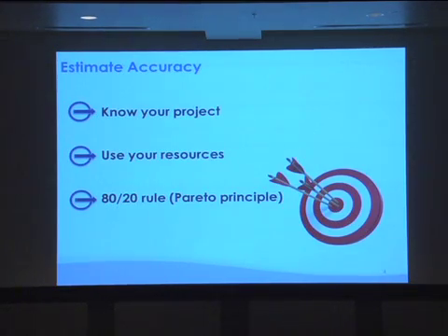So, how are we going to do this here? Well, first and foremost, cost estimators need to know their project. They've got to get out of their cubicle, go drive the project, and see what's involved. They need to understand the neighborhood of where this project is. Is it out in the middle of nowhere, or somewhere inside the big city? Where can my materials expect to come from?